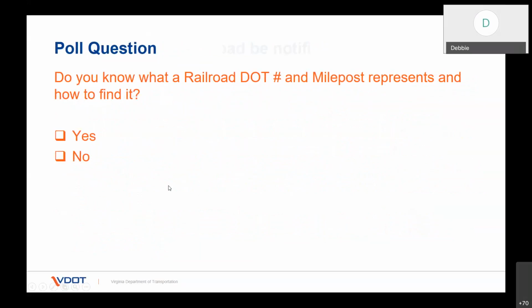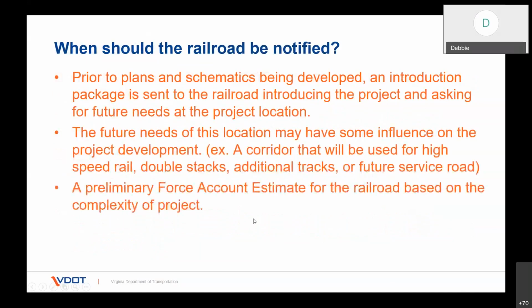When should the railroad be notified? Prior to plans and schematics being developed, an introduction package is sent to the railroad, introducing the project and asking for the future needs at this project location. We're going to discuss this in detail with you further into the presentation.